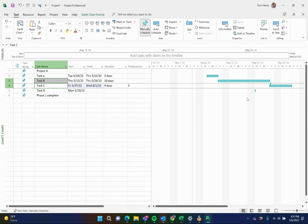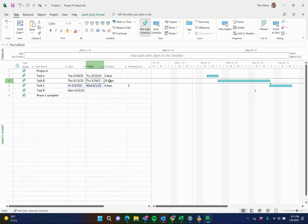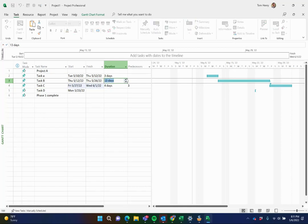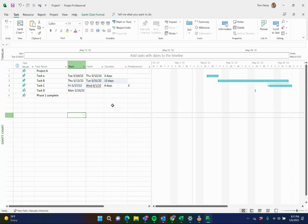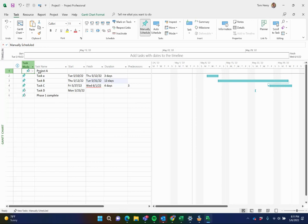And now we've got a really fluid schedule. It's building out all these things for us. As things change though, again, I increase the duration. Because we've got manually scheduled tasks, things aren't going to update. That's because I've turned the scheduling engine off for the most part. There's a little bit there, but it's mainly turned off.